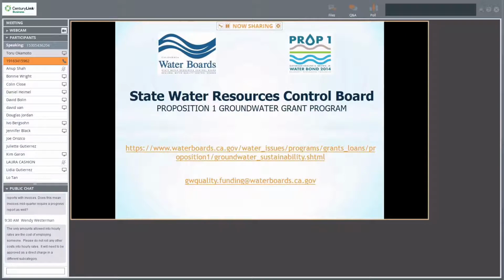Any other questions? I think in the last workshop, you did mention that we can't claim hours back until November of 2014 for match. November 14th, got it. Yeah, that's for match only, but for direct costs, you can use the date of the preliminary award letter. It would be the start date of your agreement. A lot of times on our projects, it's the preliminary award letter. But if it happens to end up being that date, that's fine, but it's actually the start date on your agreement for reimbursed dollars.